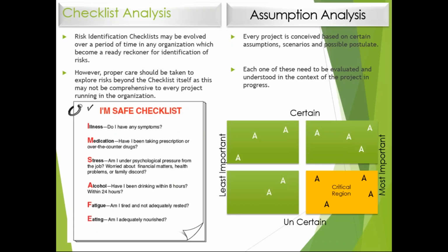So that is your checklist analysis. Assumption analysis: what are the different assumptions based on which I'm conducting the project? For example, if I'm doing it in the real estate industry, the steel prices will not exceed beyond 10%. The cement prices will not exceed by X percentage. Now, all that are my assumptions.